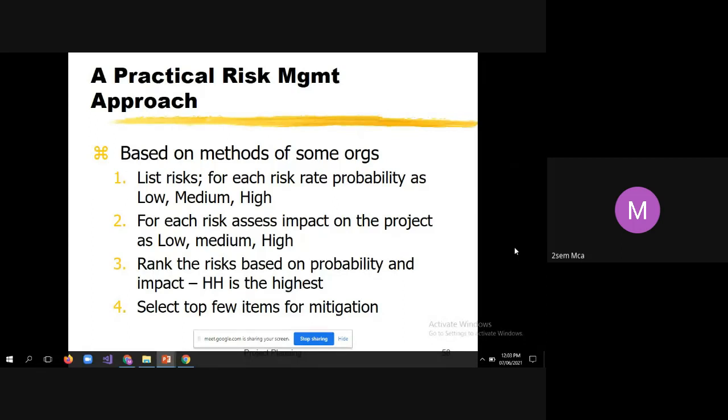Select the top few items for mitigation. Practically, check the probability of a risk — if there are high chances, give the value 'high'; if nominal, give 'medium'; if chances are very less, give 'low'. Similarly assess the impact.